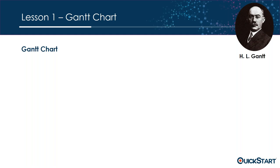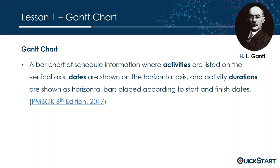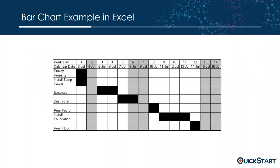Let's dive into lesson one: Gantt charts. The definition, coming directly from the Project Management Body of Knowledge sixth edition (2017), is: a bar chart of schedule information where activities are listed on the vertical axis, dates are shown on the horizontal axis, and activity durations are shown as horizontal bars placed according to their start and finish date. Key words: activities, dates, and durations.